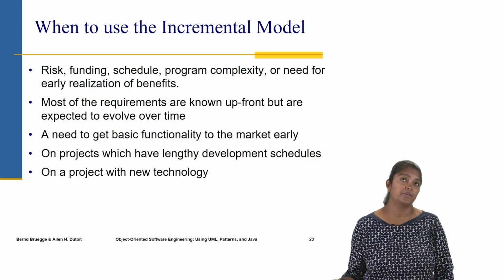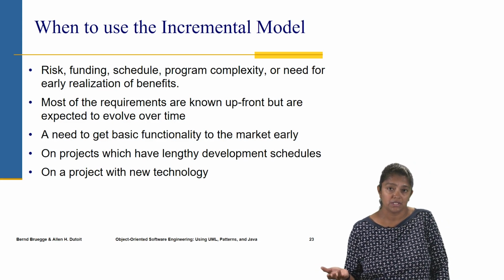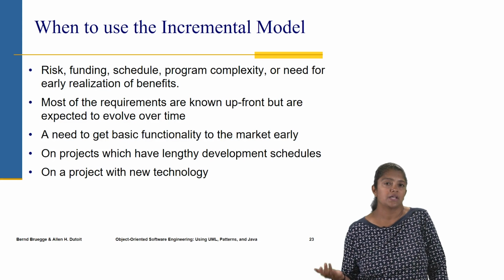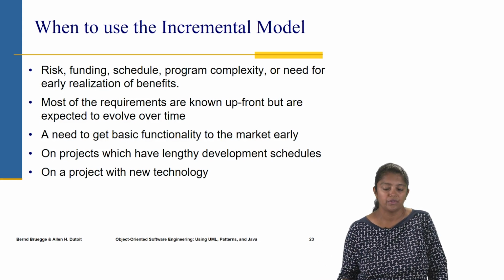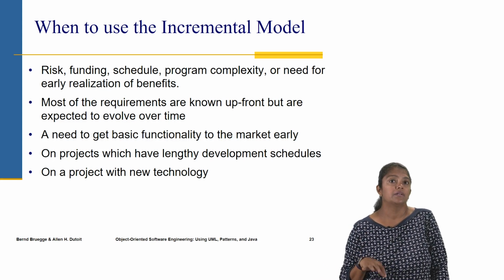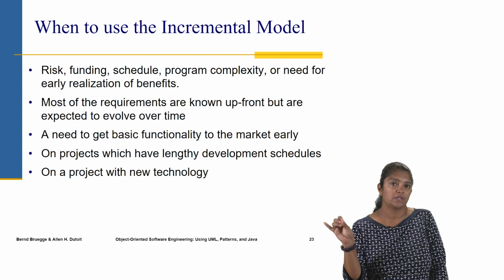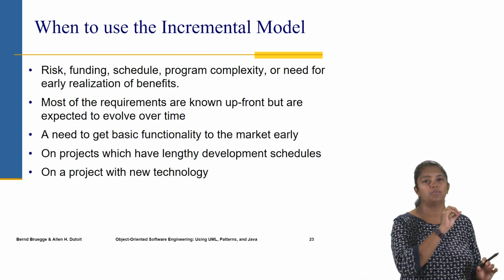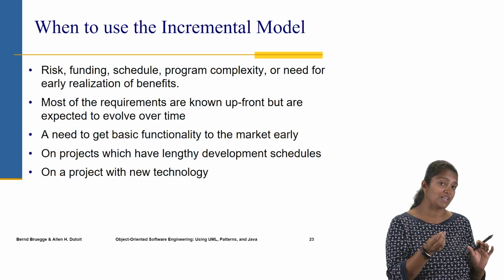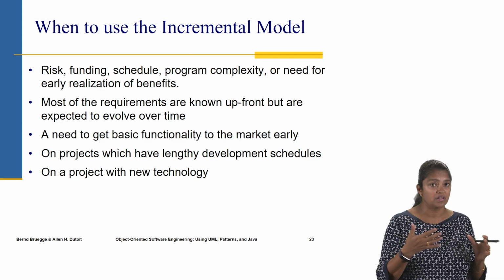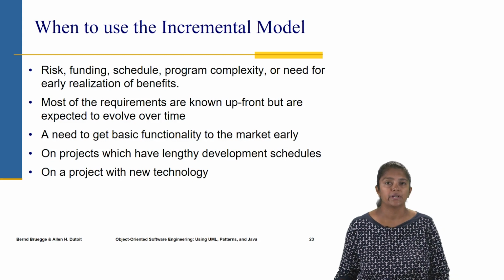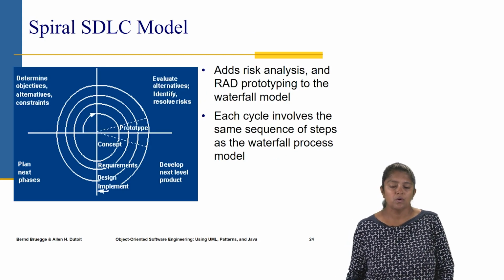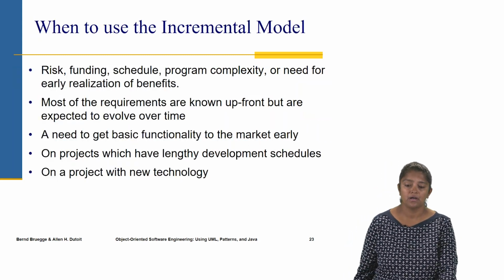And then if it's a project with new technology, then that adds some risk as it is. So again, with those kind of projects as well, the incremental model is a good idea, because with the new technology, the most important functionality or the complex functionality can be implemented and tested and made sure that it works. So that was the incremental model.